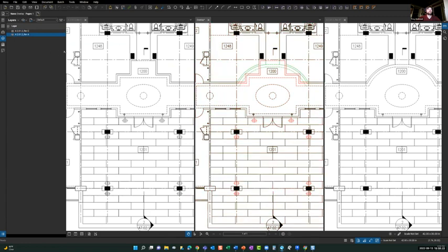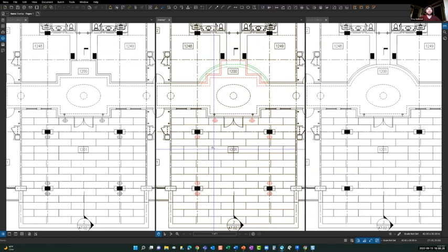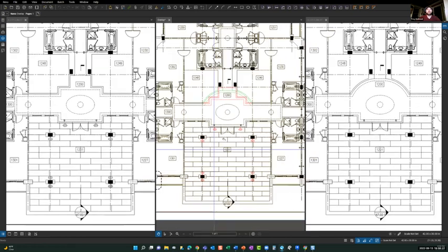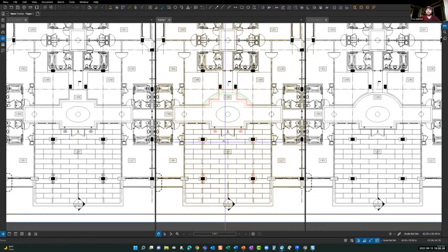So this is a great tool to actually show what changed when those change orders come through. You can overlay these and know exactly where things moved or changed. If you had a bunch of markups in here for quantities and you overlaid this, now you can just adjust those markups instead of making new ones, and all of your quantities will update in the markups list, which we'll get to later. So great tool for that.